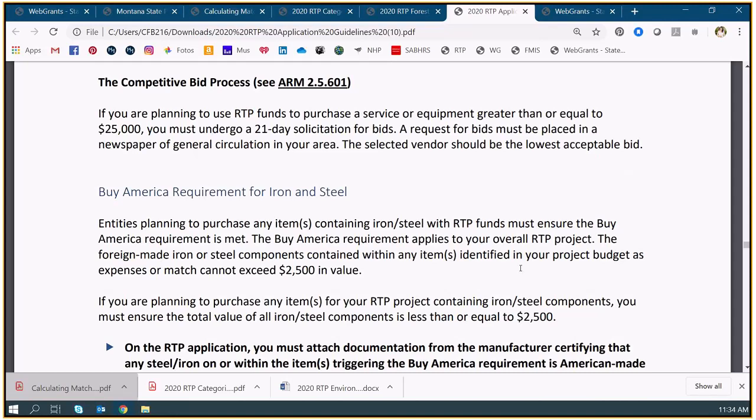I'll just make one more comment because I think it is an important one. Appreciate the lowest acceptable bid, and this is in federal statute, that if there is a known history of a vendor or contractor not doing acceptable work, that is certainly part of that procurement decision. To me, that would come in with what constitutes an acceptable bid: this vendor's history has shown that.